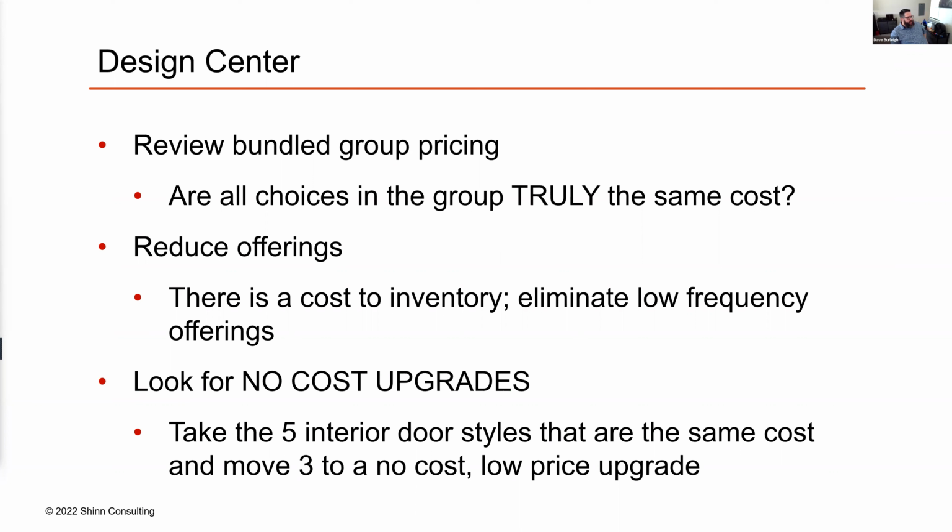And then when we're looking at that blended average beyond just the cost, I also want to look at what my upgrades are. If I'm selling a lot of the cabinets in that blended average that are actually lower than the average, but I'm virtually never selling that one that's weighting the cost of that group, I definitely need to get rid of that style or colors from my base group so that I can get a true blended average of the things I'm actually selling.